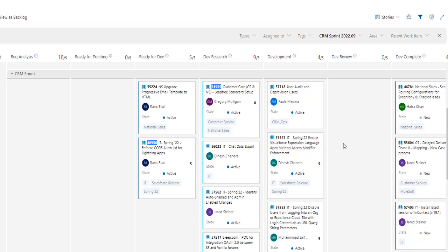Once we meet the deadline of the development work, whatever user stories have been completed during that time, we push those user stories to QA, and then the dev team will give the demo to the QA team, and the QA team will do the testing and provide the sign off on those user stories.